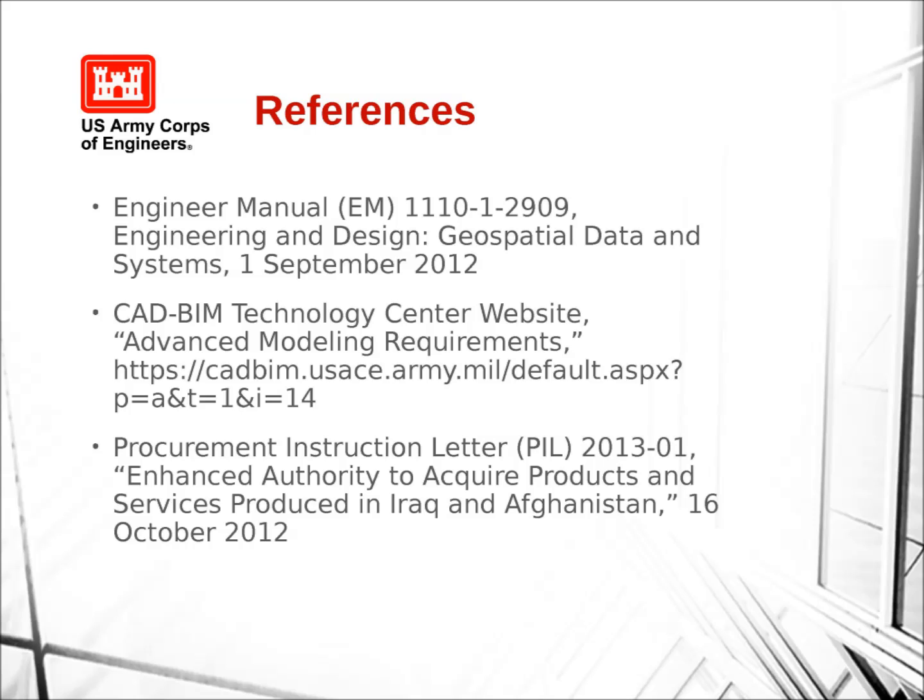Yeah, Jason, the reason that we cited that particular procurement instruction letter is because it specifically addresses capacity development and limitations in Iraq and Afghanistan. We have executed design projects using BIM and SIM in those countries. However, that particular PIL sets a different threshold for site acquisition, which goes to the Afghan equivalent of the small businesses. And because of the drastic difference in capacity between the small business contractors and AE firms in Afghanistan and Iraq and the larger contractors, we worked with the Transatlantic Division to set that threshold to be consistent with that bill.